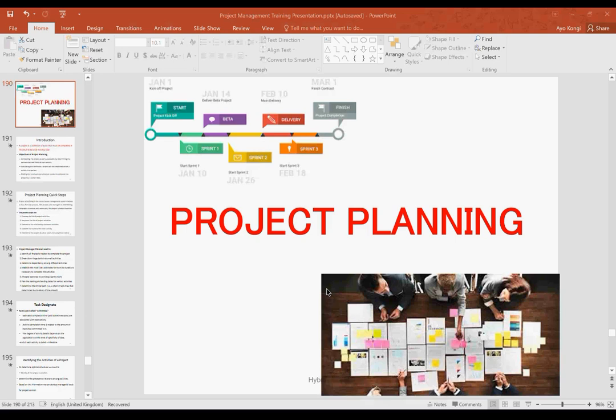I want to tell you that for what we are planning, within our management strategy, we can say that any activity that is more than 20 days, we have to break it down. If an activity is more than 20 days, it is not manageable anymore. So we need to break it down into more manageable components. Say we have an activity that is 50 days. I can tell you that 50 days activity, no way, we need to break it down. Can we break it down, please?